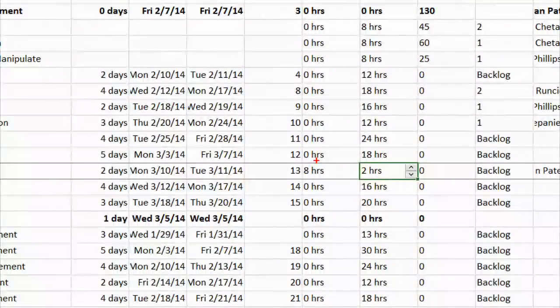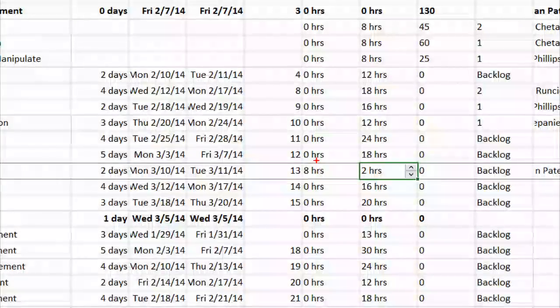No, that's not correct. Yep. The answer is, let me repeat this for the recording: the comment is that it's not capturing time-phased actuals, and that is false. It is capturing time-phased actuals on that activity because it has to go against the task. Now, in TFS, we're not saying on Tuesday I did this type of work. It's saying here's actuals remaining. It begins moving there. Chaitan, you want to expand upon that?